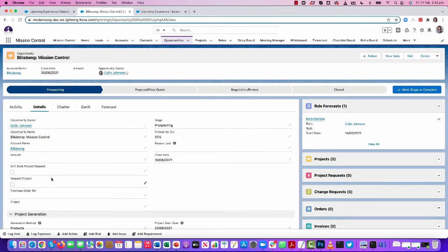So obviously the idea being that you're able to build out multiple role forecasts for multiple different resources. For example, you might need Colin on for the start of the project during February. Then he might get allocated to something else, and then he might be needed back in May to check everything has been delivered as per specified. So adding all of those role forecasts against the individual roles, you're able to make a soft forecast booking against them.